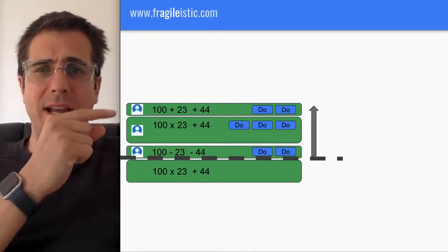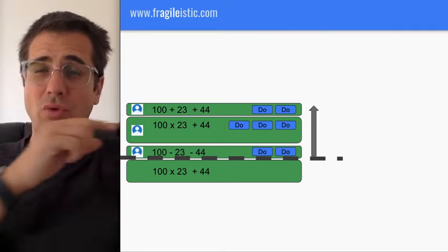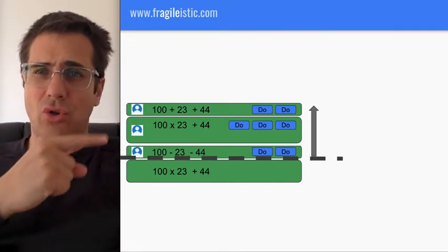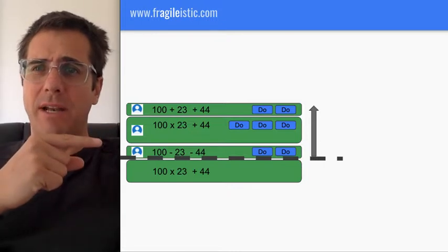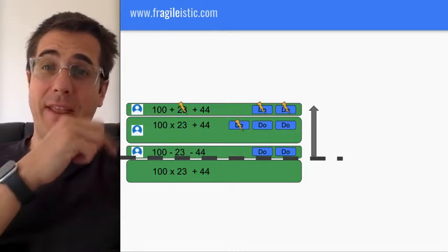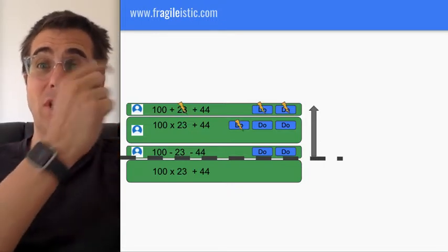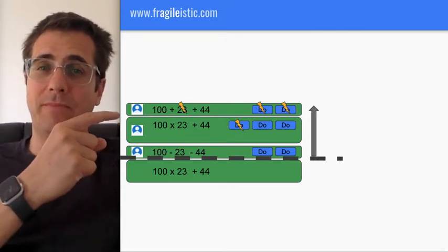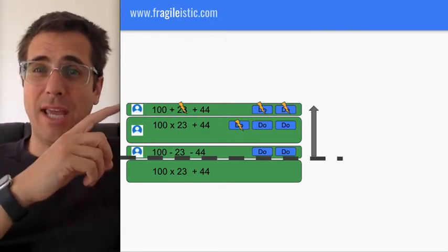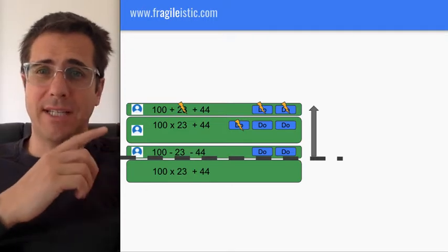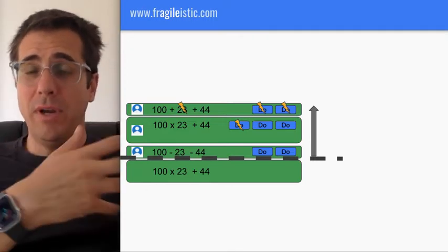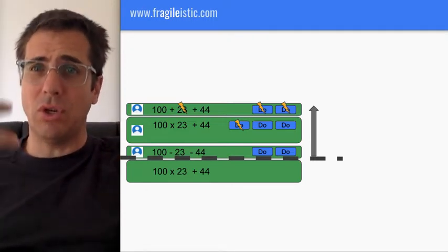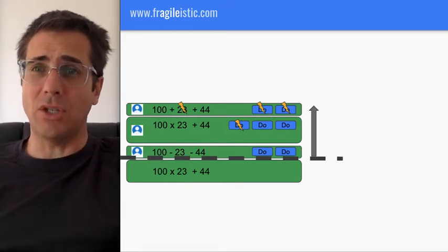Inside each of these, I've got the actions as to-dos. They're tasks, really. These are the stories, the outcome we're going to deliver incrementally, and over there are the to-dos. The idea is that if we get those tasks done, then this can be done. So this might be the second or third day. This one's done, we've done all the tasks. On the second one, we've done the first task. Now we need to get these things done today. So always a focus on getting things done. That's what makes a good stand-up.